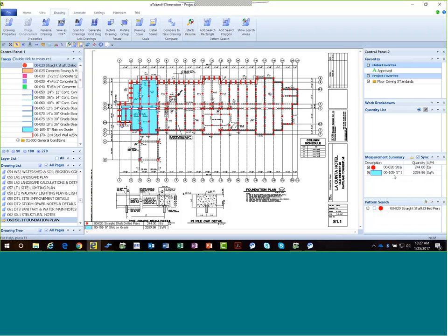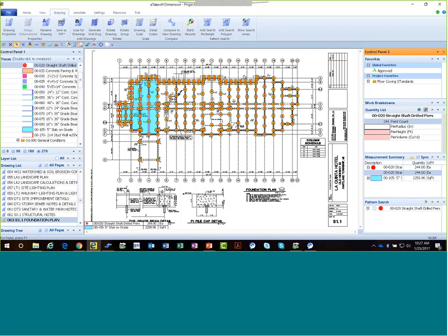What that does is it adds to my measurement list that we have 244 of these piers. When I highlight that, I have to finish the rest of it. I need to tell it that it's 24 inches in diameter, and they're about 20 feet deep, and that's quite a volume. But then again, we're looking at 244 of these. I'll put a description on here and simplify it to piers.